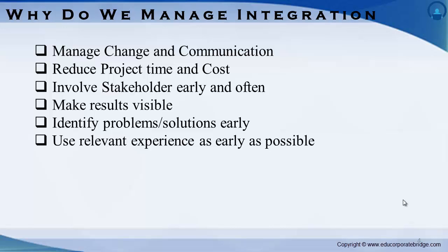We also do integration management to save time and cost of the project. Let's see how. A project manager keeps on observing the plan to see if there is any scope for improvement, whether he or she can make some activities run in parallel to reduce time, or whether he can reuse some of the earlier developed things to save time and thus save cost.